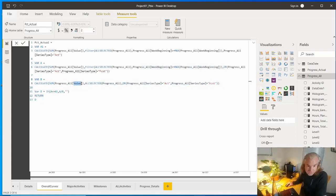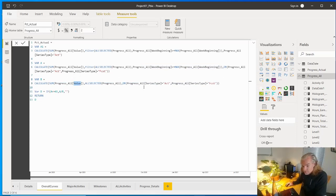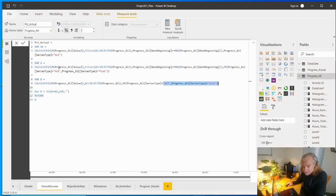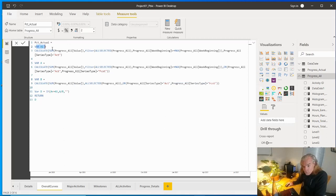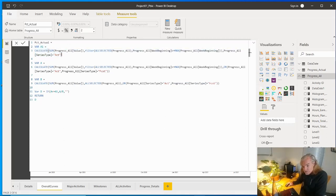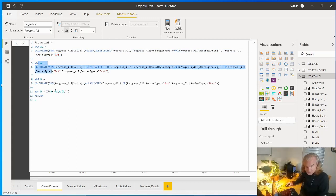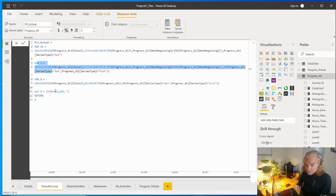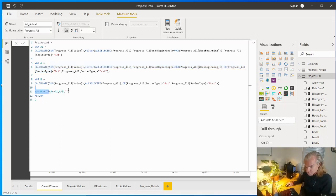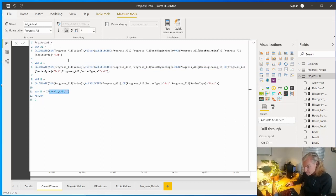Sum up all my hours total for actual or forecast. Our condition is going to be we're going to call A1, and A1 is just going to be looking at the actuals. We're going to sum up the actuals and obviously where A becomes bigger, that would be after the data date. So we can put a little condition in there. That's where we get our actuals from.